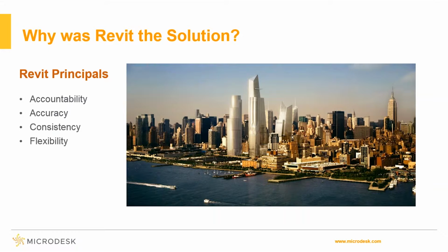The consistency was a very big thing that they needed. As you can see, 90 elevators, and that's just between Tower A and the retail podium. This also spans the other parts of Hudson Yards, which are Tower C and the Plaza platform. And so we utilized the same solution and implemented it across several yards on the overall Hudson Yards project, which once this was developed, we saved a ton of time and cost for the client because we weren't reinventing the wheel.